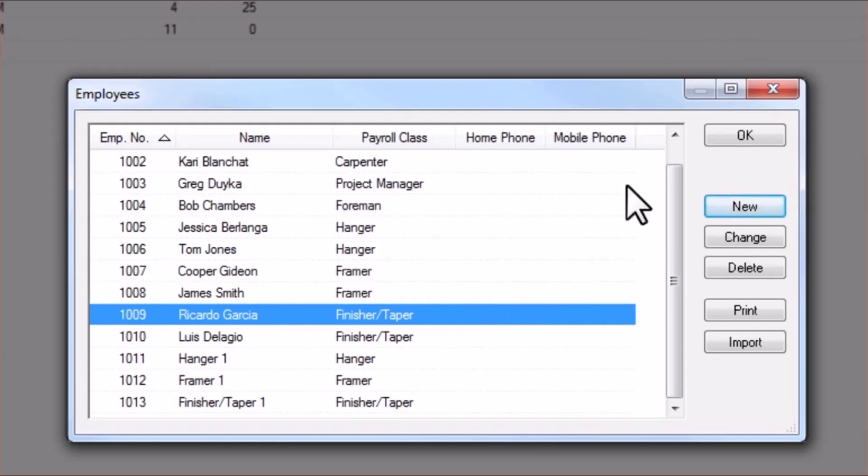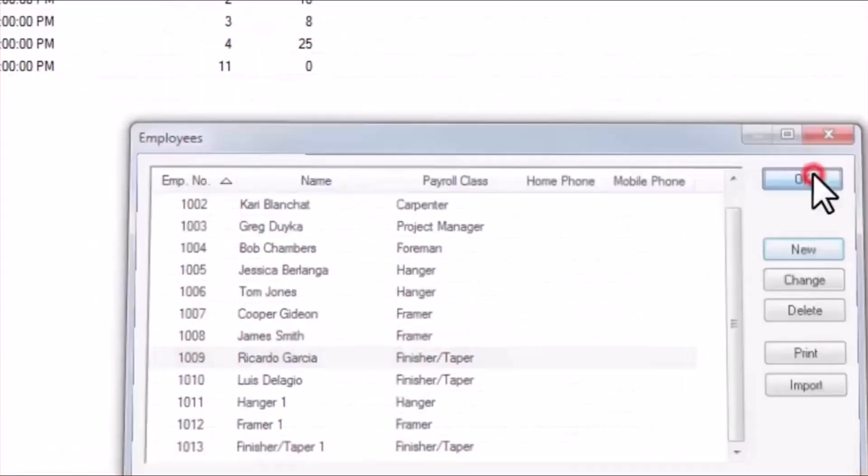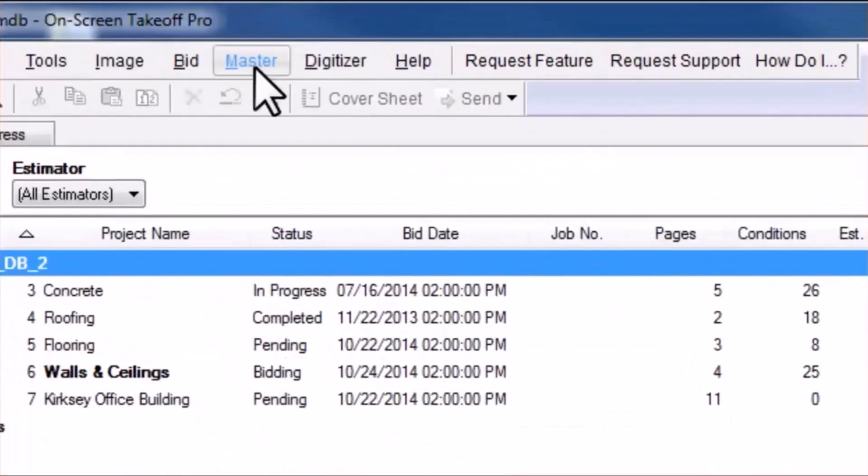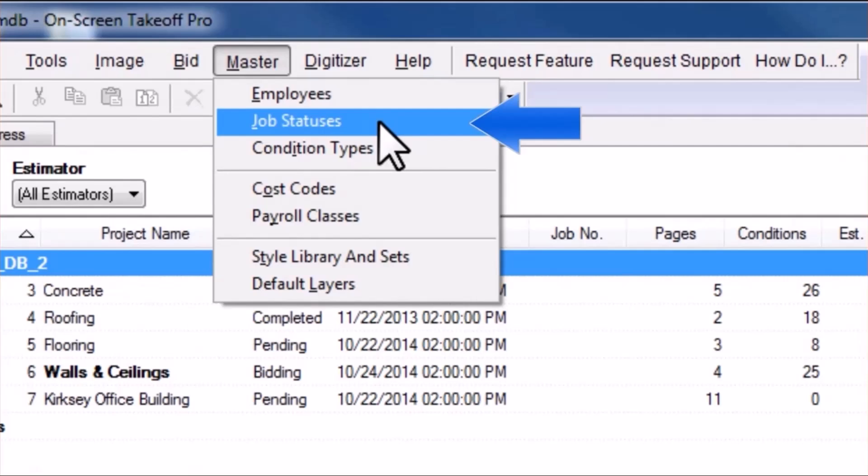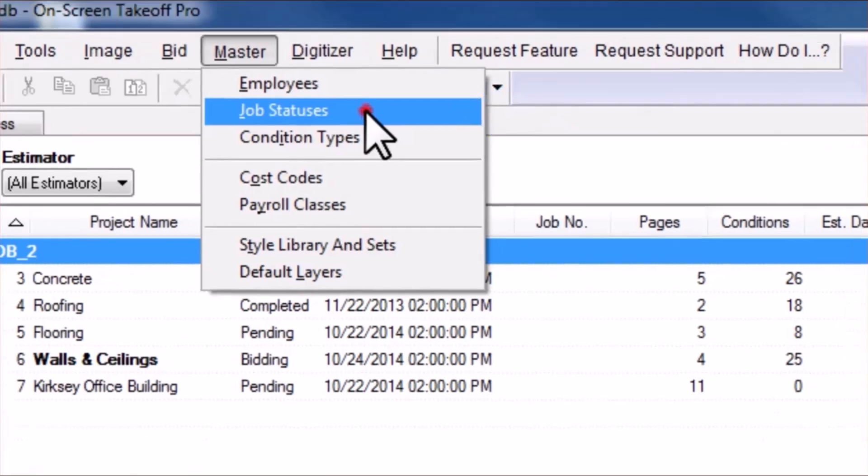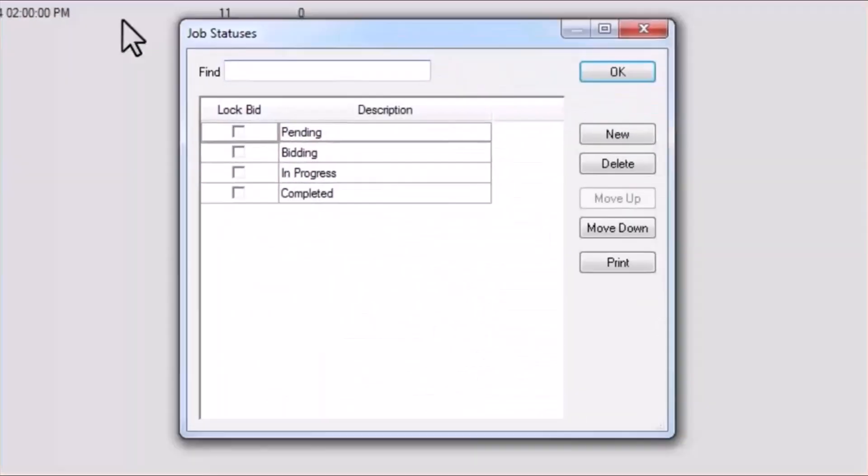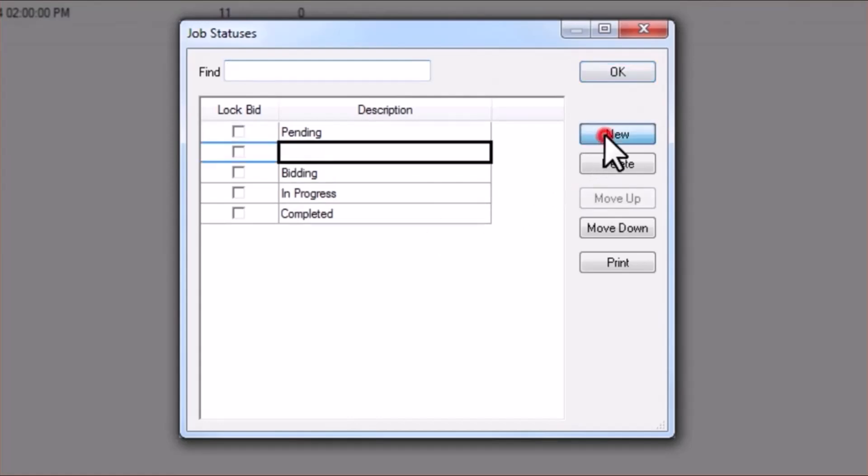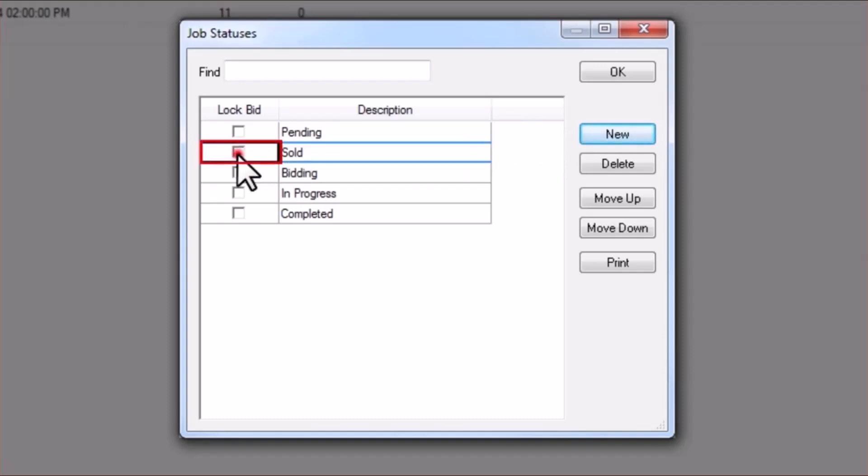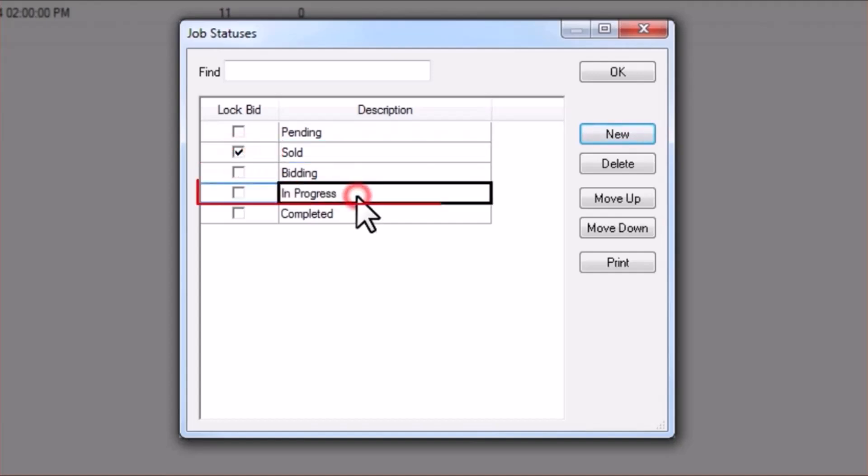Next, navigate to the Master menu again, and this time, choose Job Statuses. If you don't have it already, create a Sold status and place a checkmark under the Lock Bid column so that any job with this status will be in read-only mode. Also, be sure to create an in-progress status as well.